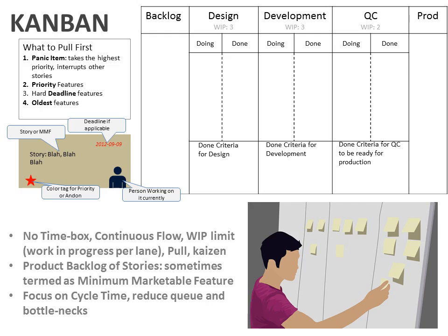The brownish grayish box basically shows some of the key components of the info that is on a Kanban card. So you can see there is the story, of course, similar to any agile story. Then there's a deadline, or there can be a start time defined there when it has to be picked up, and once someone pulls it, the name of the person goes into it.